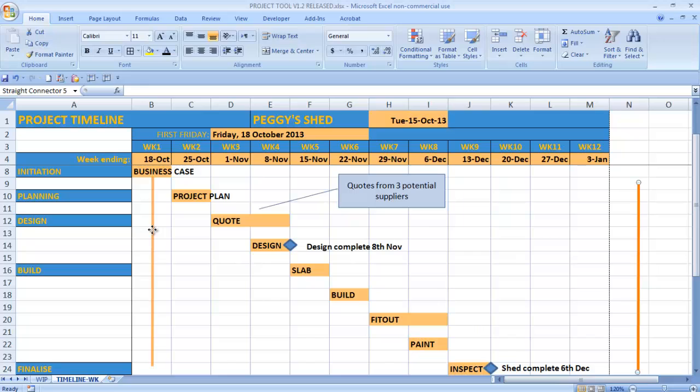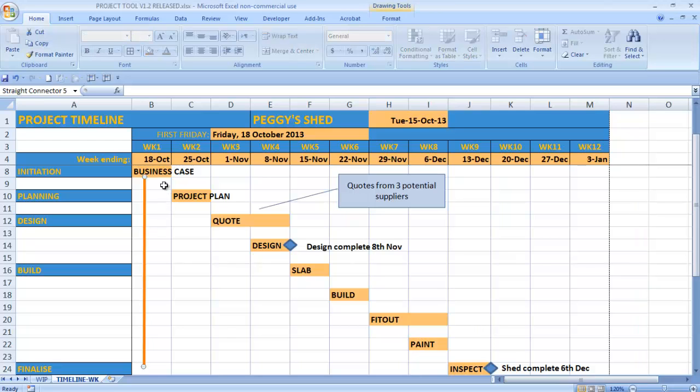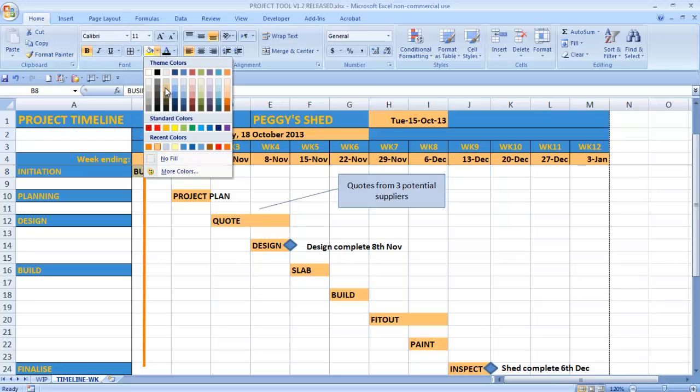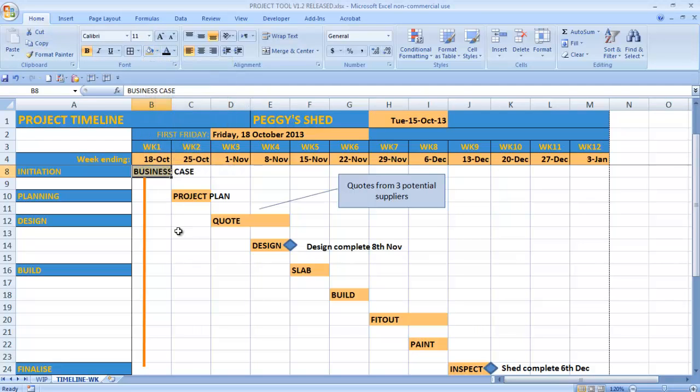We might also want to annotate in the week there. We might finish the business case against the quotation piece, so we can make it a different colour to show progress. We're making good progress. We have call outs here, and we might just grey that out, building up a picture of the level of detail. Grayed out means it's finished to our audience. So that's a weekly timeline.